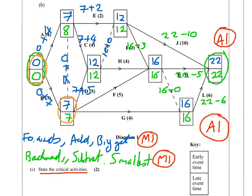Now that doesn't mean that activity B is critical. Is zero plus the length of the time, which is seven, seven? Yes. So B is critical. But don't assume that all doubles between them are critical. If I take the sixteen, sixteen here, and the twenty-two, twenty-two here, the activity K has a length of five. And sixteen plus five is not twenty-two. So that is not critical. But critical activities must pass between these double points that I have written on my graph.